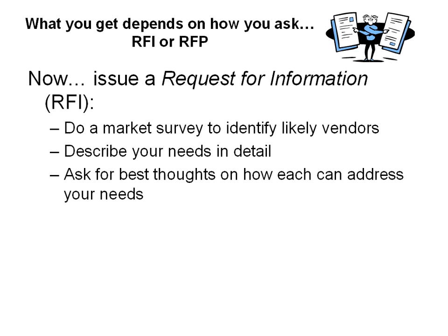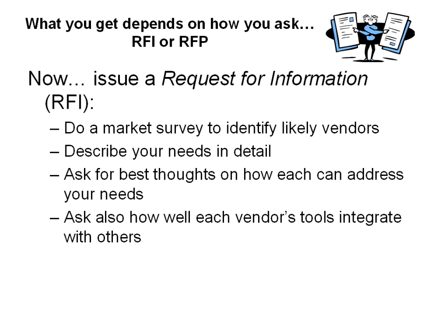Ask the vendors that you issue this RFI to for their best thoughts on how they can address your needs. You're not asking them to sell you something at this point. In fact, if you look at a federal request for information, it says very specifically right there, we're not planning to buy anything off this. So give us your thoughts, and we'll evaluate them, and we'll get back to you. I think that makes good sense across the board.